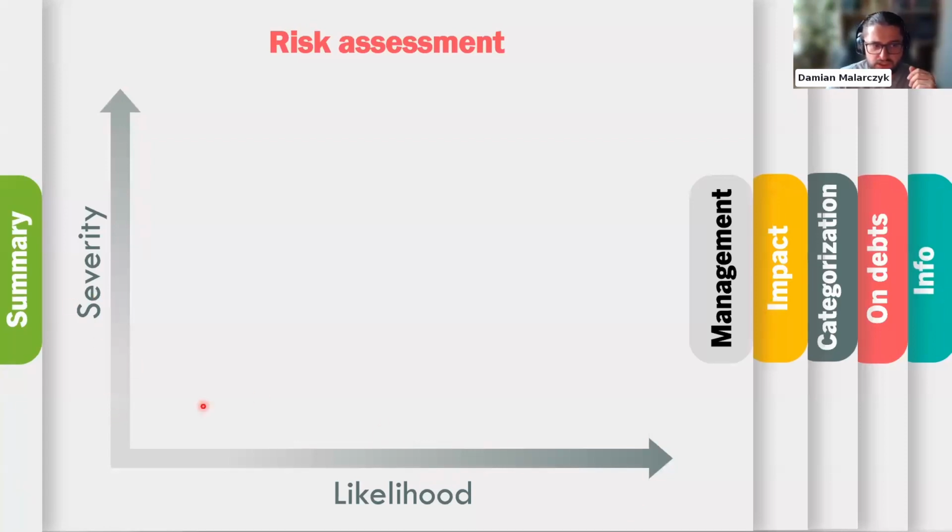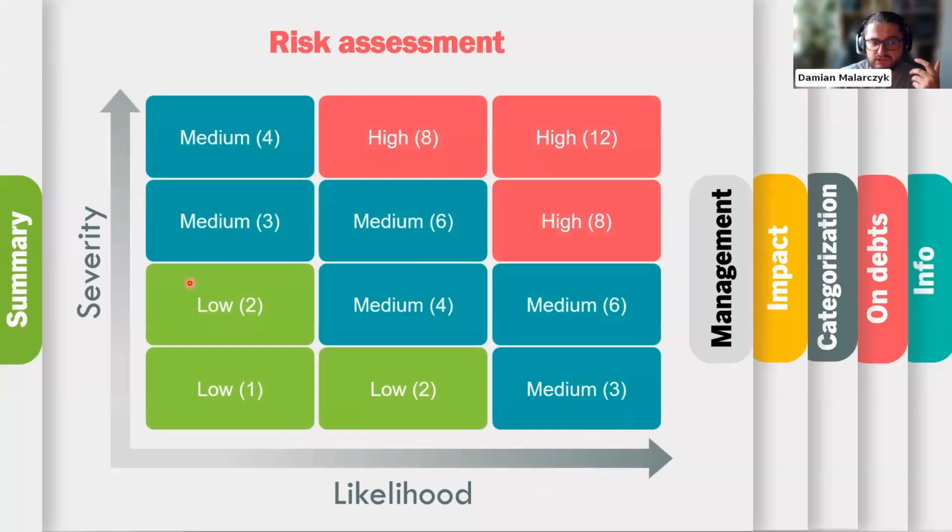And similar to severity, low severity could be something like, I have to spend 5 minutes each day on making a workaround or something, to a very high. If we don't fix it within an hour, we can get a lawsuit. And in the end, they will give some matrix, which is basically multiplying likelihood with severity. The purpose of this is to give a vague look if some risk is actually really high or really low, and that will help prioritize paying off debt case by case. It's not like ideal estimate, but it's always better than nothing, that's for sure.